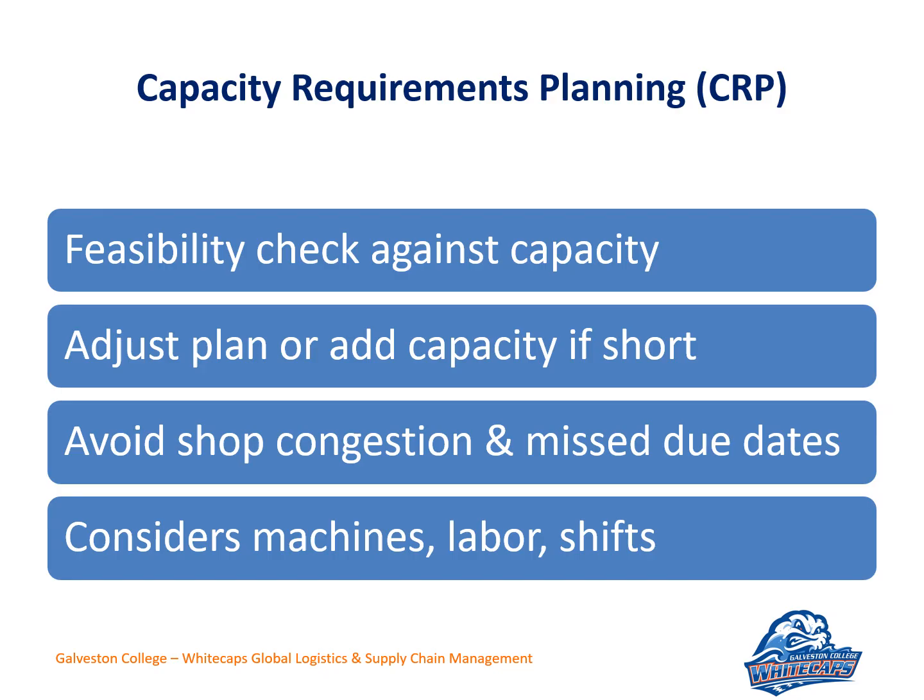And if you've got a long stretch of time, where can I bring in subcontract people to perform some of the more menial tasks, so I can take these qualified manufacturing assembly engineers and put them on other roles, so we can still meet the product demand, and take the ones that I can train someone to quickly and have them doing that job. I love subcontract for that. And shifting loads, alternating shifts, so there's more product being made in a day with the same amount of people, but they're shifted throughout the day. A lot of ways to adjust your capacity requirements.